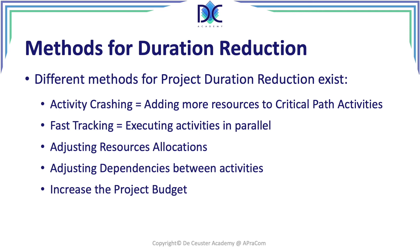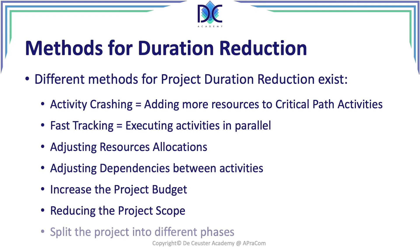Another possibility is to increase the project budget, investing more money in duration reduction initiatives. We can also talk about reducing the project scope, though this cannot be done without talking to the project sponsor. Finally, we can consider splitting the project into different phases — delivering the total work so that phase one can already be used, with additional capabilities delivered in subsequent phases.